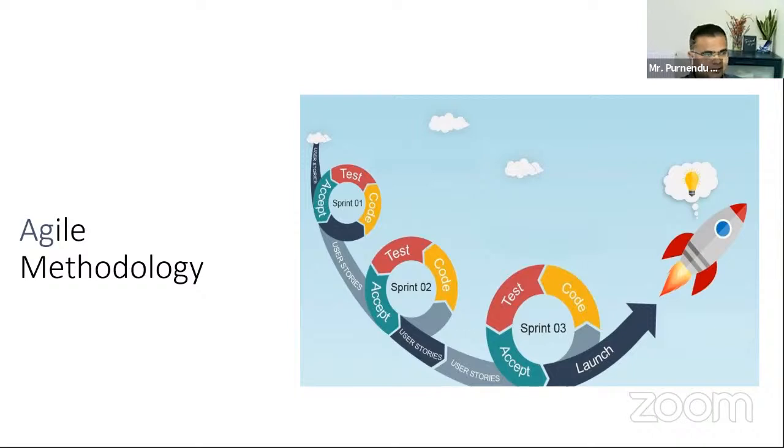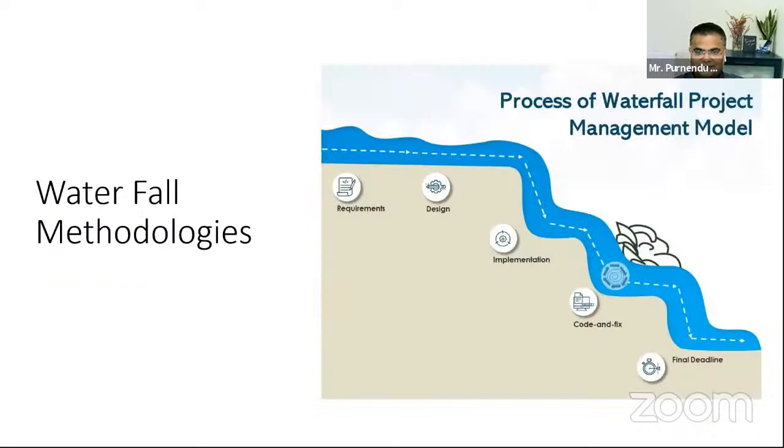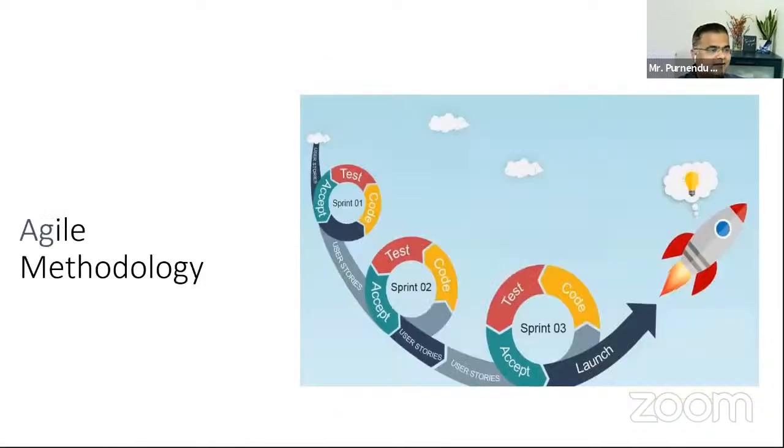So what you really do is, you don't want to get into that long cycle, right? You don't want to get into a stage where your testing happens 8 months later, and then you realize, oh no, what we understood and what we developed is not right. So if you see our previous place, this is the place where you identify that there is a problem, right? It is already too long. You have already invested 7-8 months. So either customer will have a choice, depending on how big a change is, they might be forced to scrap the project, or they might be forced to redo the project, but that doesn't happen in Agile.